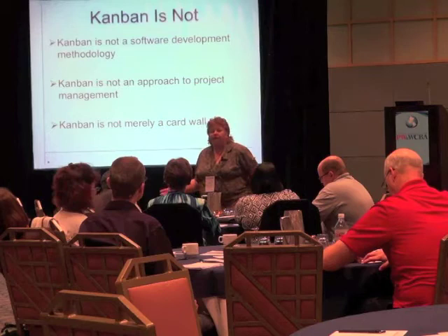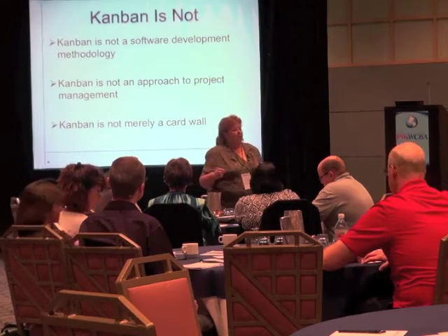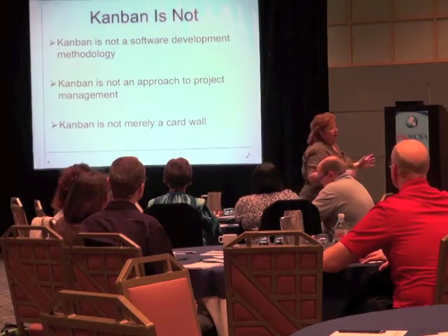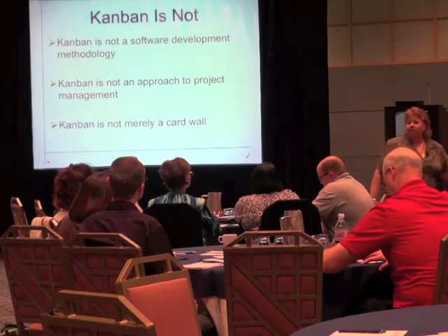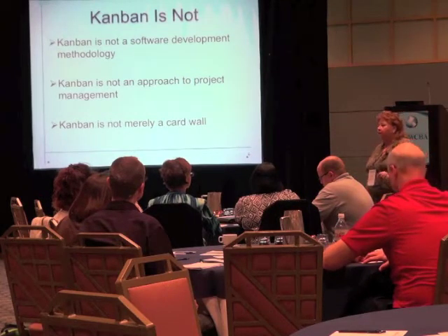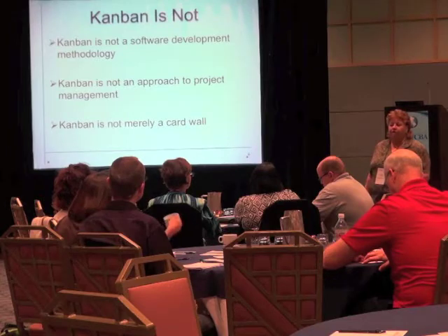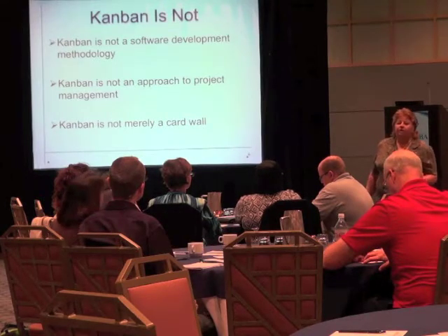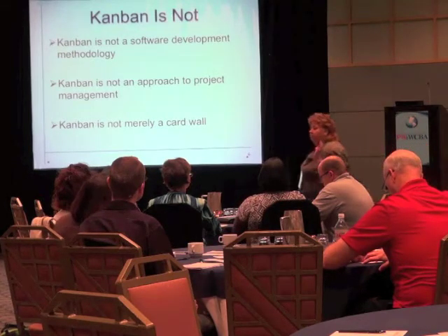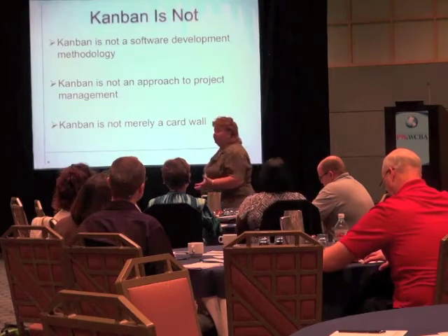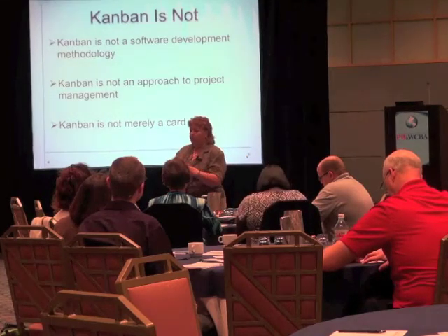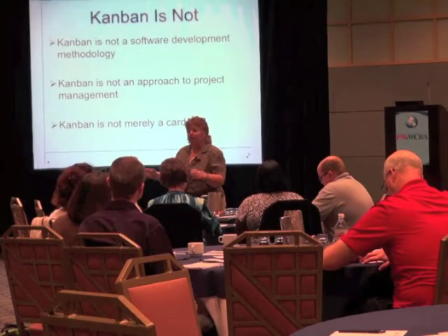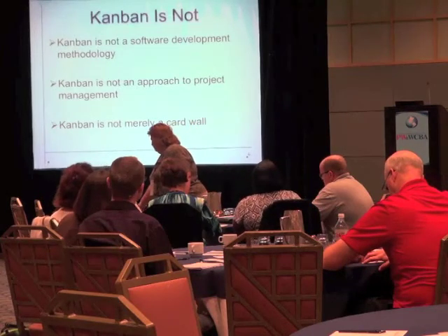A lot of people start out in the Agile space, right, by putting up this huge visible chart, and they just start putting the work up there. And that's a great way just to get started. But until you're looking at your work in progress limits, you're not really practicing Kanban. You're merely moving cards along the wall, and that in and of itself is not bad. So it's not just the cards, it's also managing that flow. That's the essential aspect.